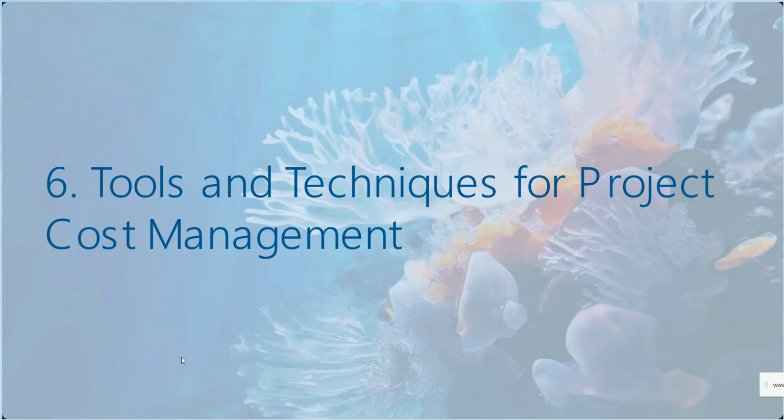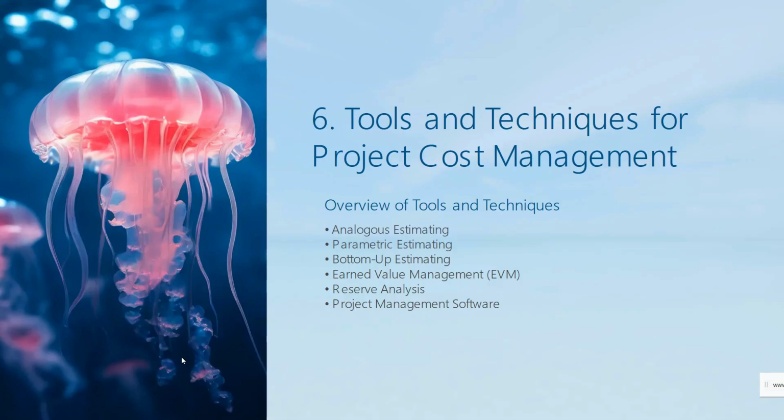After that, we have tools and techniques for project cost management. Therefore, let me show you here the tools and techniques for cost management. Overview of the tools and techniques. First is the analogous estimation. This method uses historical data from similar past projects to estimate cost for the current project task.